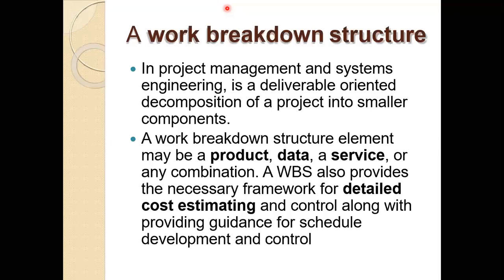And we can know these things because of this work breakdown structure. Is that right? So this is one of the important parts of the work breakdown structure. Okay. This part also provides a detailed schedule, and you can develop that schedule also. Suppose you provide 10 days to that particular foundation work, and in 10 days that foundation work may not be completed, you can modify the schedule and provide 12 days to that. That facility is also possible in the work breakdown structure.